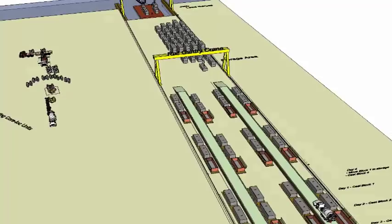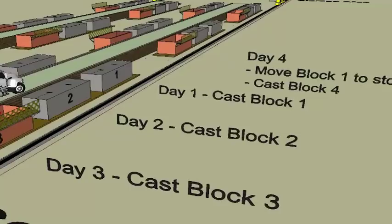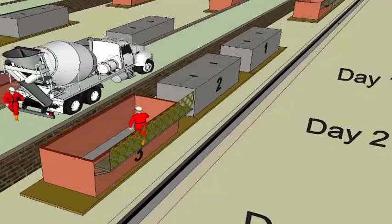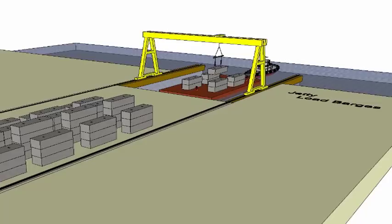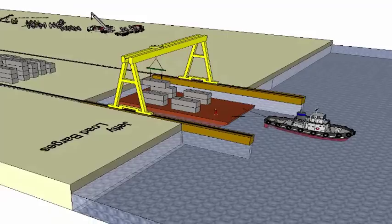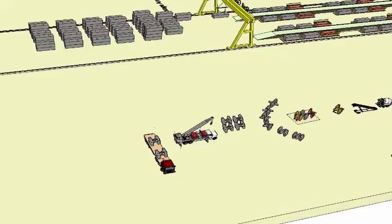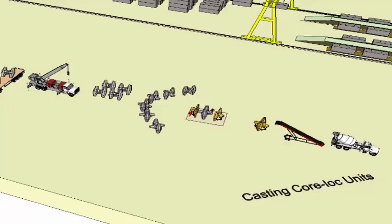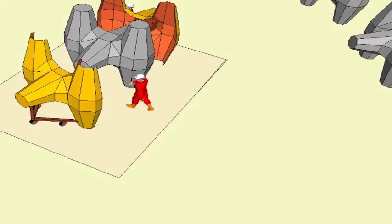Precast Yard. Full-scale sample castings are constructed to demonstrate and document that all the requirements of the concrete and the execution of the work are fulfilled using the actual methods and performed by personnel that will carry out the future castings. One concrete component of each type is produced for approval. The approved castings were retained in a dedicated area for quality assurance purposes. All works were inspected in accordance with the Inspection and Test Plan (ITP) on an ongoing basis, in accordance with the site project quality plan. The ITP set out in matrix form the sequence of inspection steps, the governing document, specification, standards, the standard to be achieved, the persons witnessing and the supporting documents to be produced.